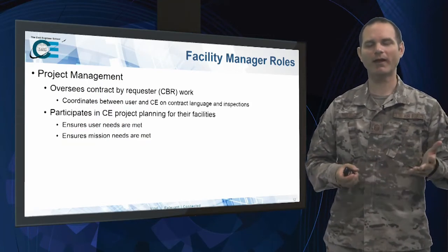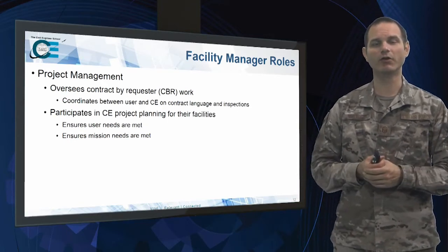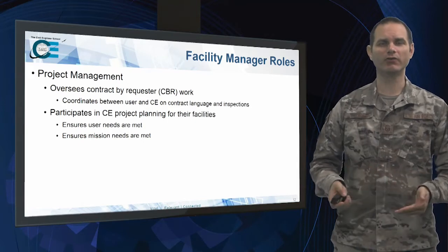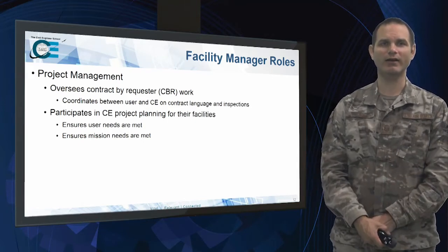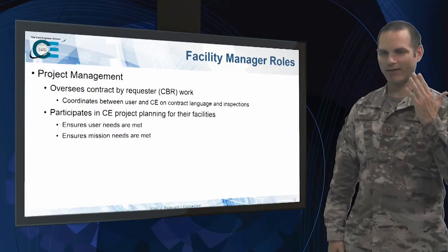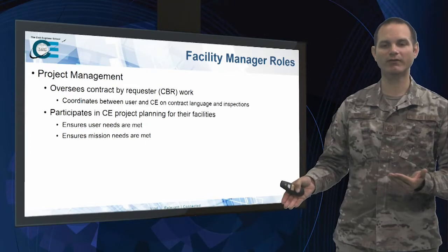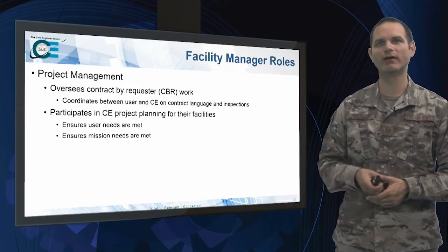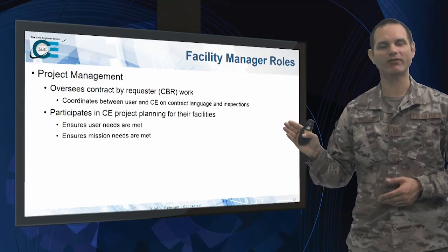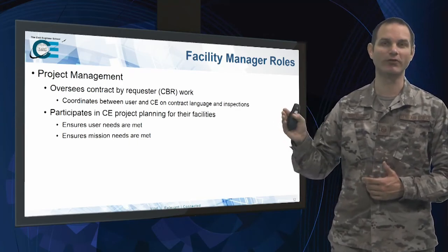All right, project management. So for the bases, the facility managers, the units that are doing contract by requester work, they're going to be coordinating between the user and the CE on contract language and inspection. So let's say that they want to do the carpet in their facility. They're going to submit the request to us, but before they submit that request, they're going to come up with the sample verbiage for their contract language. They're going to come up with the contracting document, and they're going to send that to us to go over.